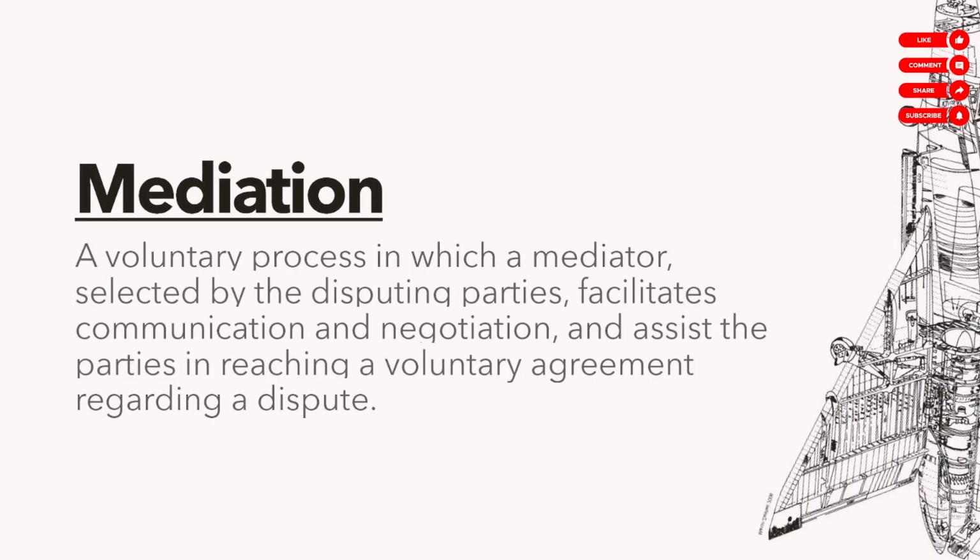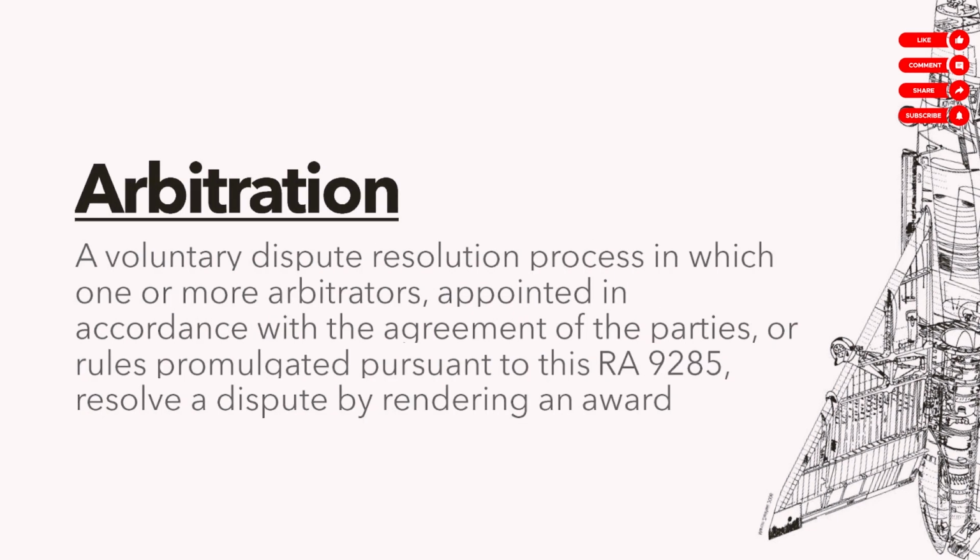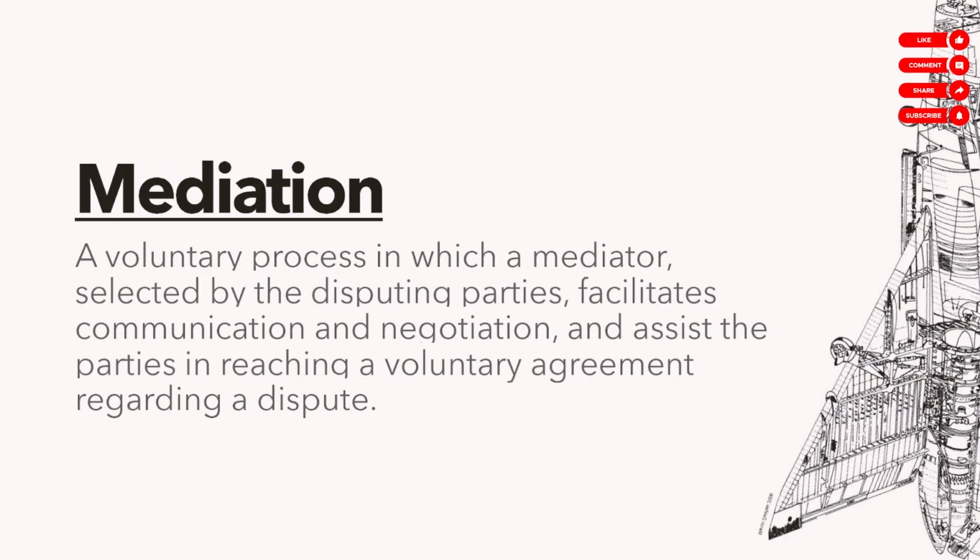Okay? Iba yan sa mediation. Kasi mediation is a voluntary process in which a mediator facilitates communication and negotiation and assists the parties in reaching a voluntary agreement regarding a dispute. Ang mediator naman, hindi siya nag-render ng judgment. No? Kasi arbitrator parang judge sila eh. Parang at the end of the process, meron silang sasabihin sino ang tama. Ang mediator hindi gano'n. Ang mediator parang nagpa-facilitate lang ng pag-uusap between the two disputing parties. At ang goal ng mediator is to get them to agree to a voluntary agreement, not to settle. Parang ganyan.